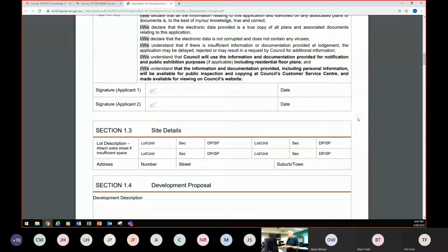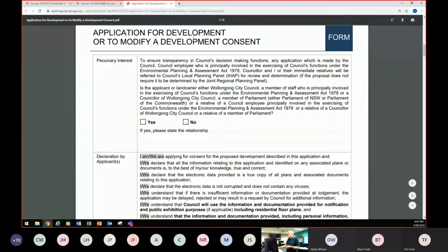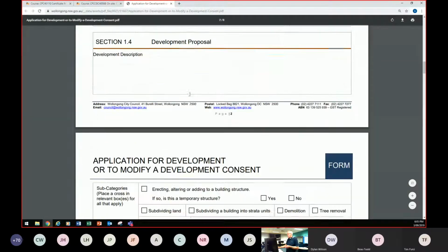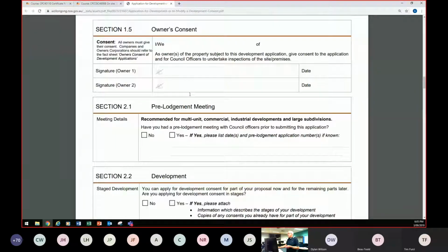There's nothing by law. But when you apply for the DA and you've completed everything as the builder, then a little bit further down, you've got to get the owner's consent. The first time I saw this, I'd filled all the forms out and went down to put plans in at the council, and they said, oh, you've got to have the owner's consent.